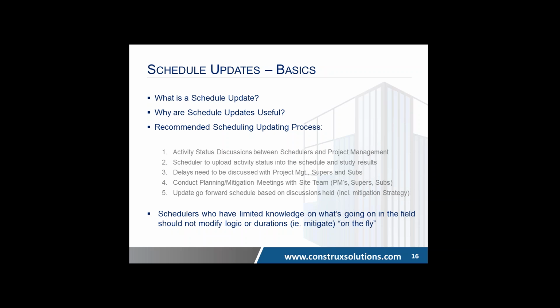Now, that something is very important. You either do something that's impossible or you do something that's possible and agreed to. And you also have to take into account what's going to cost more money. If you're going to start removing logic and shortening durations, that's called acceleration. That's called compression. That can cost money, and it can cost a lot of money, and it can also get to a point where it's impossible. If you do that for 3 months in a row, your schedule is at a point where it's probably not likely going to happen unless you spend a ton more money.